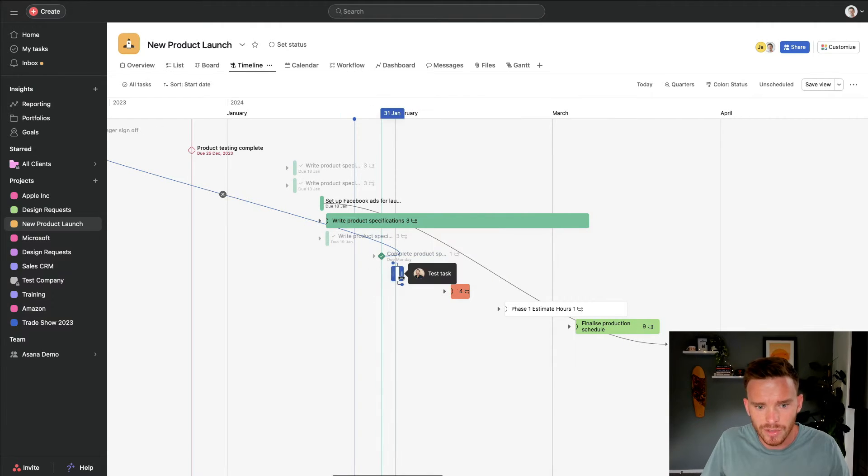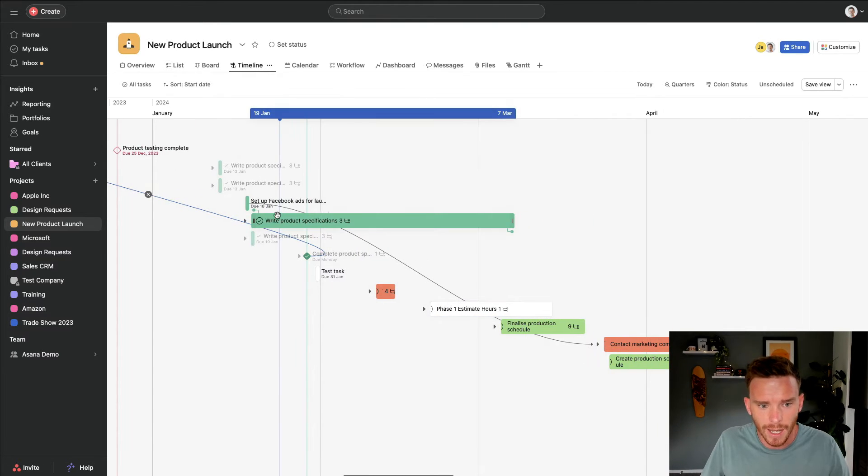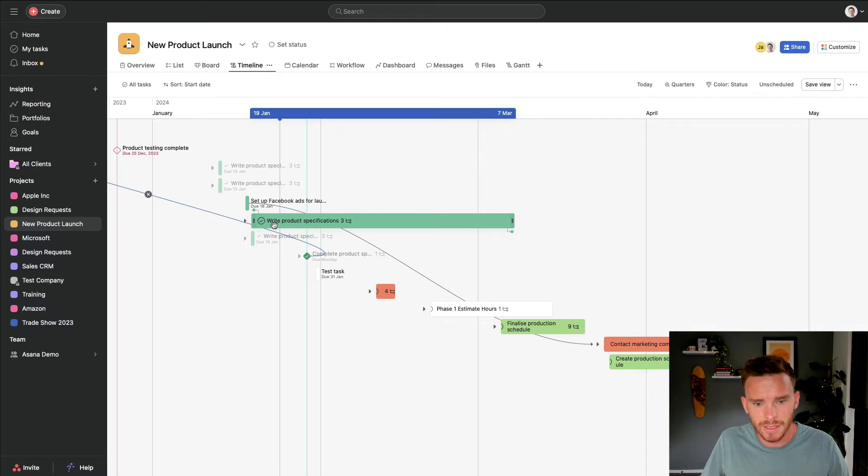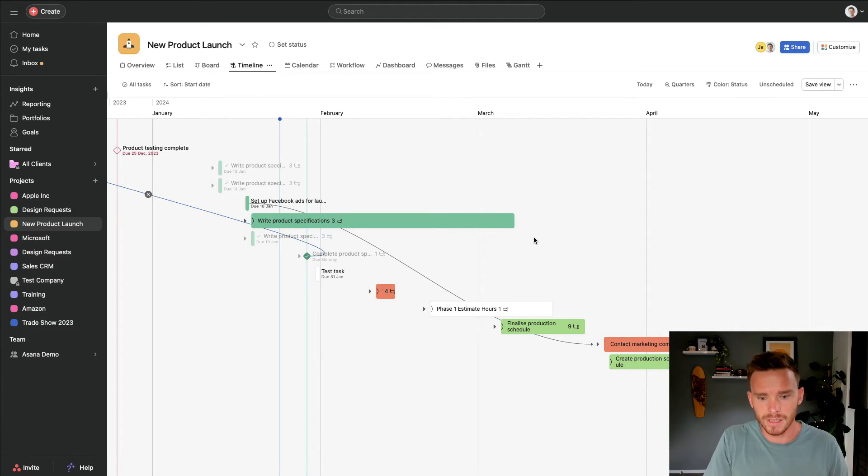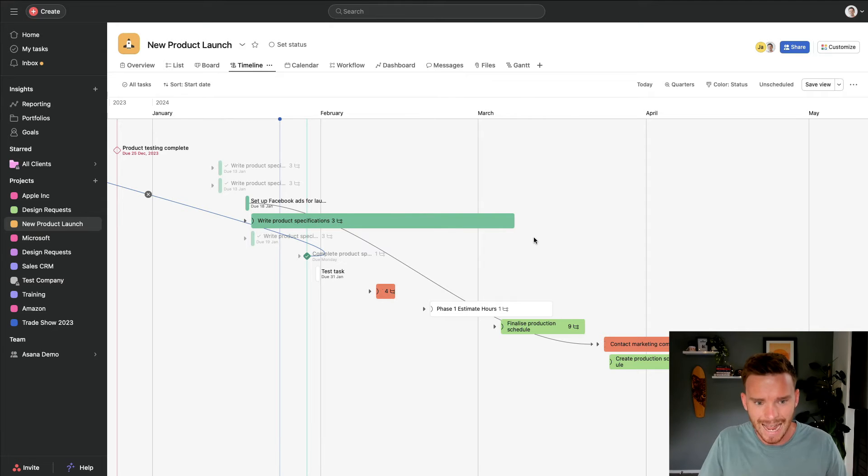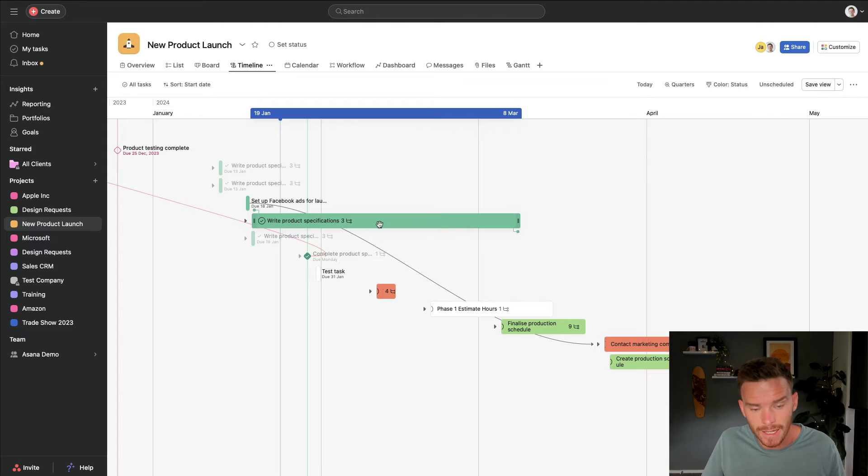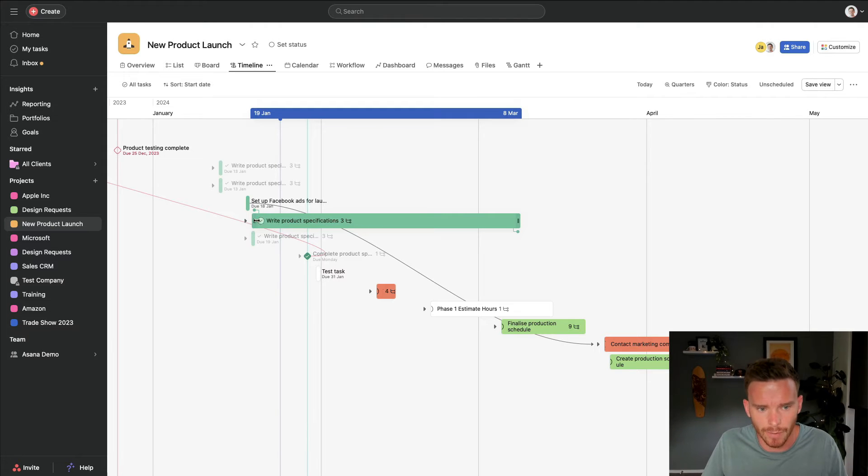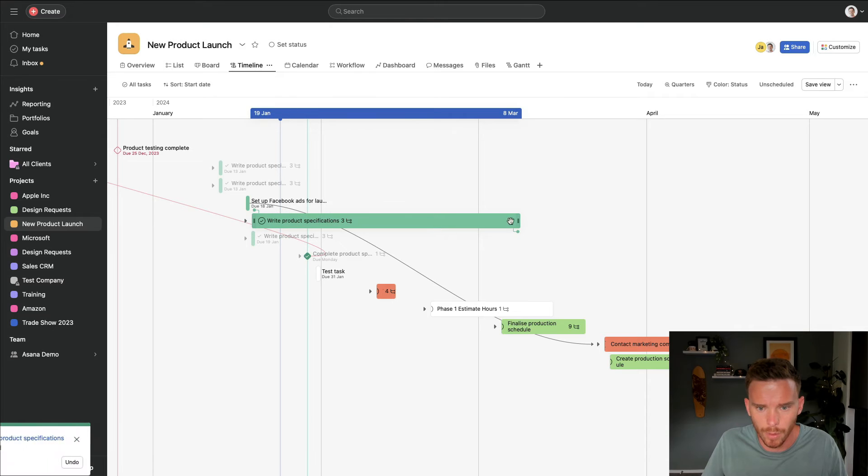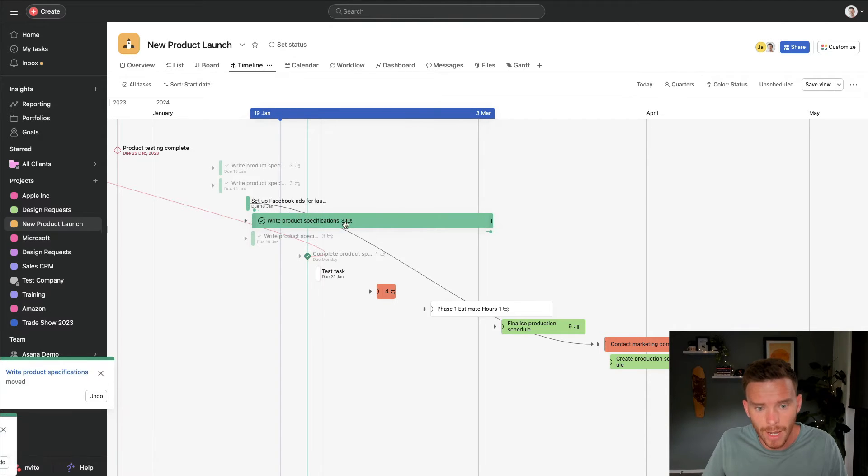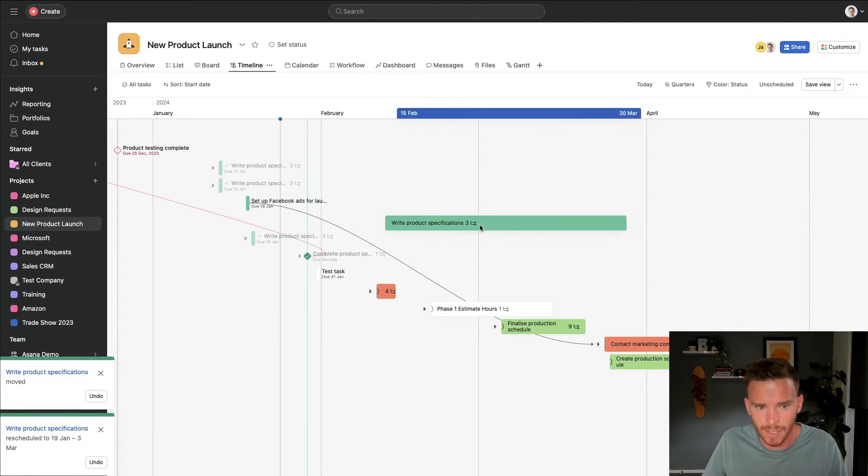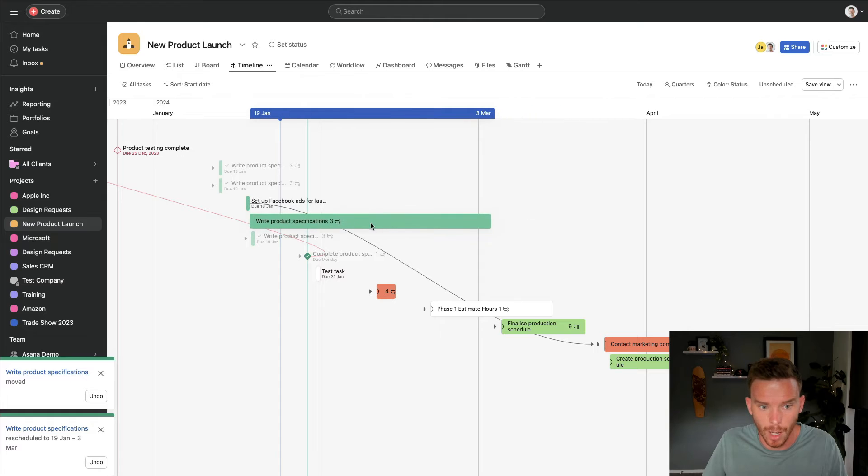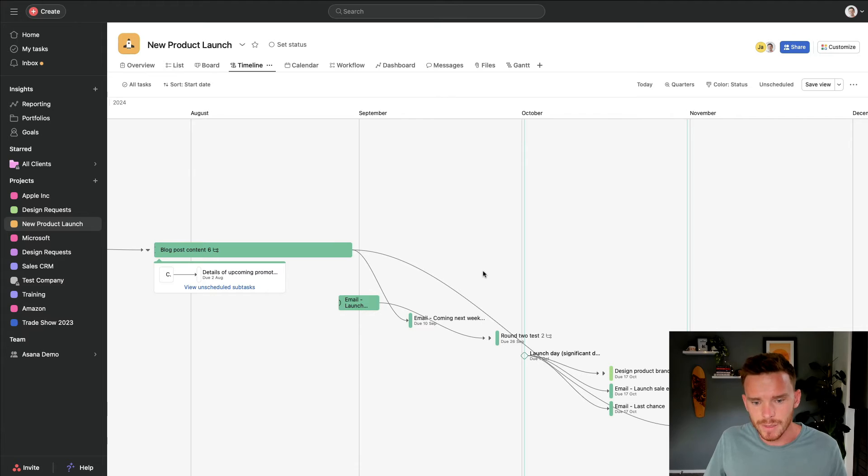I can see right product specifications here. I can also see what are the tasks that are upcoming over the coming weeks or months. I can see when different tasks start and finish. This helps me focus and prioritize on those more immediate tasks and what we need to do now. I also find adjusting the start and end date of tasks really easy in the timeline view. I can just click and drag to change my start date, or my end date, or I can just click and drag the entire task if I need to push it back to a later date.